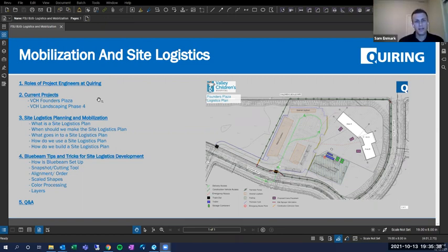Yeah, and I would say that the biggest difference that I see, a field engineer is still going to be looking at RFIs and submittals. I don't think you're really going to get away from that. But the subcontracts, the change orders, and the billings side of it is a little bit less on the field engineer and more on the project engineer. The field engineer is going to be more running subcontractor meetings, working more closely with superintendents on scheduling and QA/QC out in the field, things like that.